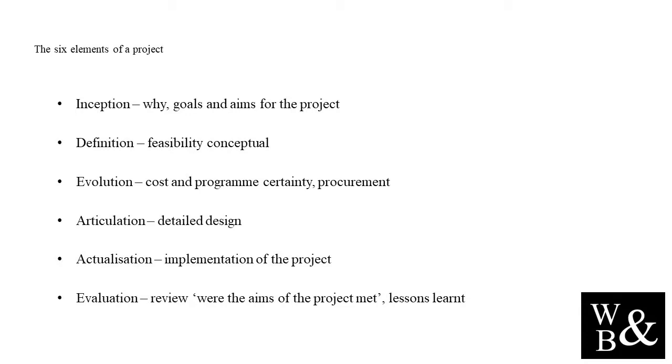One of the most important tasks in this element of the project is to identify gaps in existing knowledge and information. This will help you define for the next element what information gathering is needed and develop a strategy for gathering the information. For example, in a road project, this may be ground conditions and topography of the land and a likely road route.